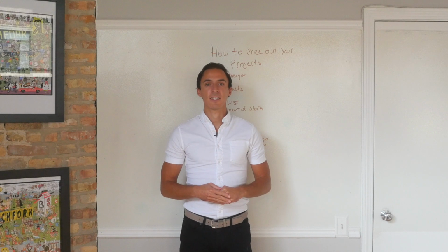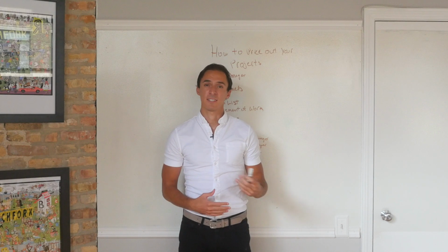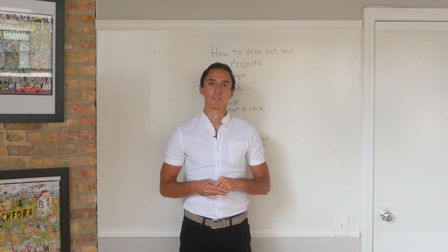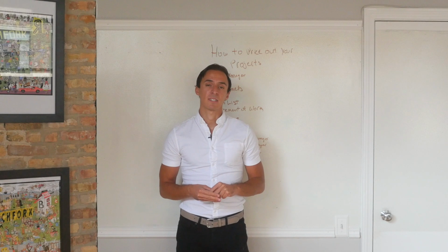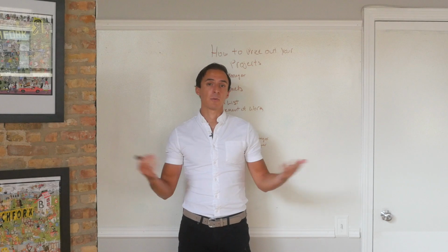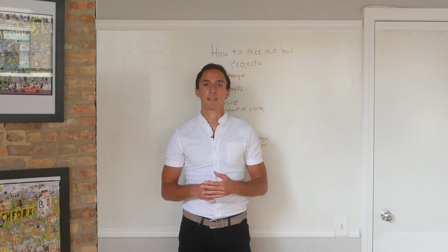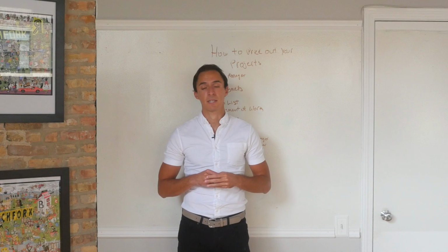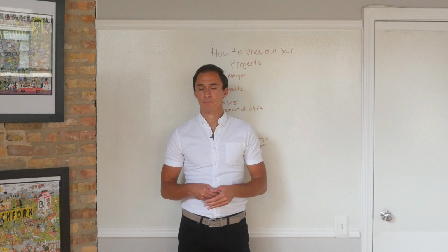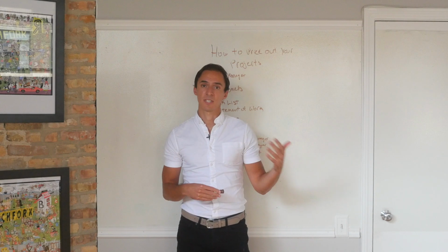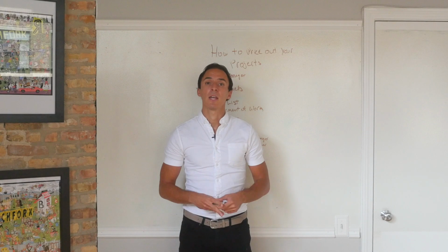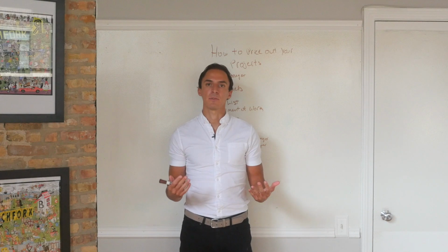As you can see, it's not as simple as ballparking a few numbers and just asking a few people how many hours they think it's going to take. It's really about getting into that level of detail and understanding how many hours each individual task is going to involve from each individual person on your team. And the best part about it is you don't have to do all of that by yourself. You involve your team in it, you ask them to help you with approving their hours and estimating how long things are going to take. And then at the end, depending on what the hourly rates are, you just sum those up. And if you have any operating costs or sales cost or overhead, you include those as well. Those will vary by agency, but at the end of the day, you can kind of see and grasp how to do this on your own.